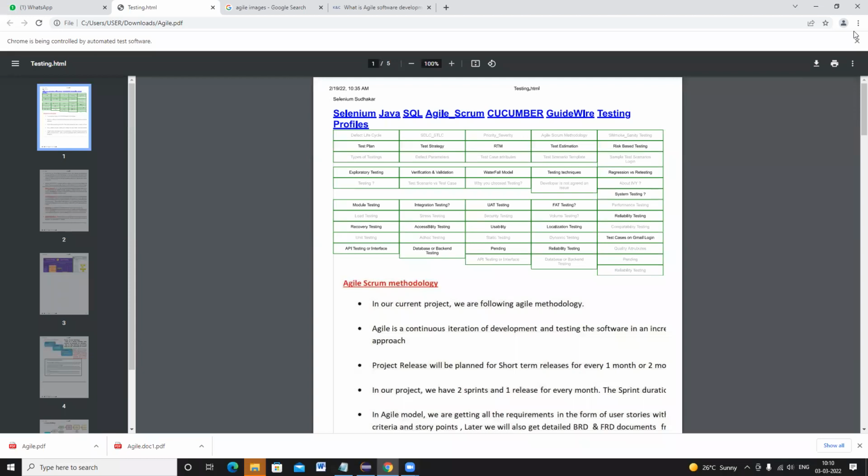We took the example of TCS and Infosys, because they have the largest employee force. So we requested them to use this software and see how the software is performing. This was a very confidential thing. Now it is okay in public. So we requested them to test this module only for their employees, and later on it came out that after 2 or 3 lakh rows of entries, the system was getting hung up.